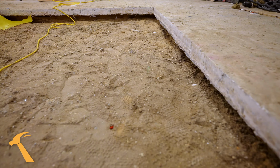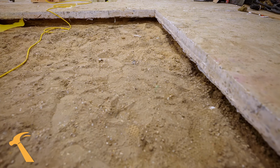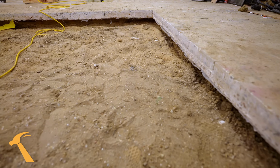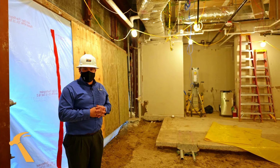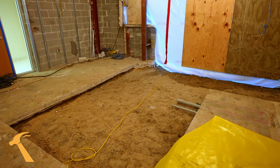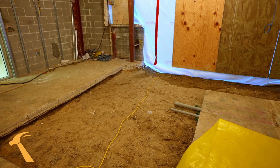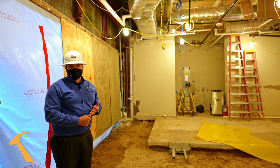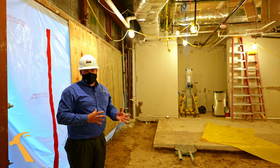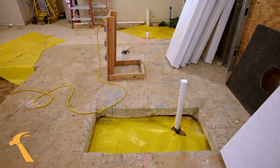One of the things that you'll notice is we had to remove a large portion of the slab in this project. Most of the equipment we install on diagnostic imaging renovations is heavy. This machine in particular is also very heavy. And so we bring a robotic station in to do the saw cutting and demolition, which enables us to, one, reduce noise and vibration, and therefore provide a better experience for patients. It also gives us the ability to work faster and more efficiently within the space.